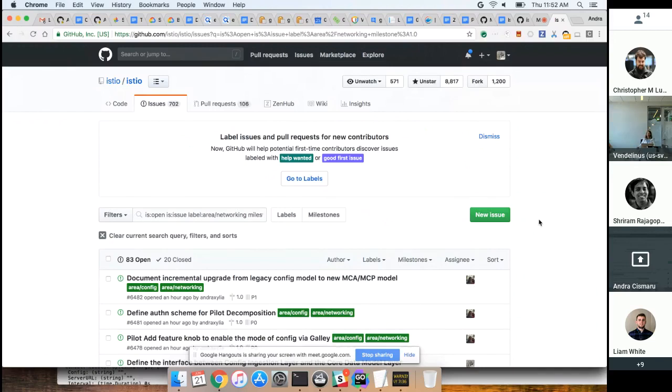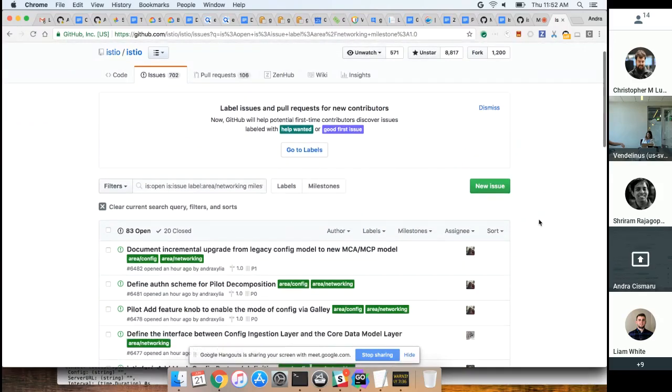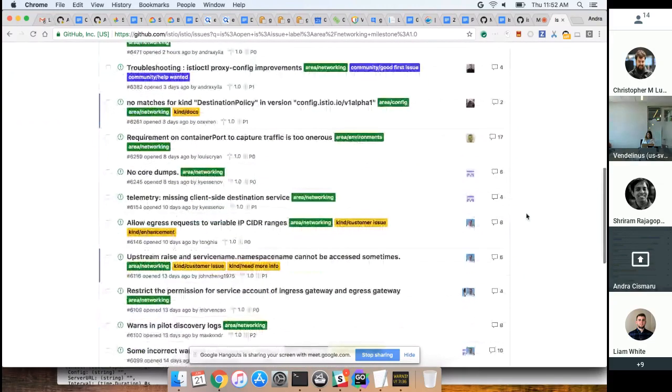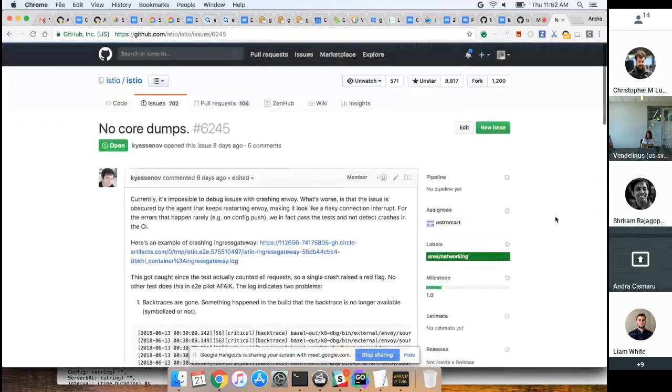For issues, how would you expect that to work? Just look at the owners file, maybe. So what I'd like to have is when an issue gets raised, if it doesn't have an area assigned to it, there's a triage process that gets an area assigned to it. Each area is assigned a group. We already have the GitHub groups like network hackers. So what the tool would do is pick somebody out of that group and say, you guys are collectively responsible for the area. One of you gets this issue to triage it.